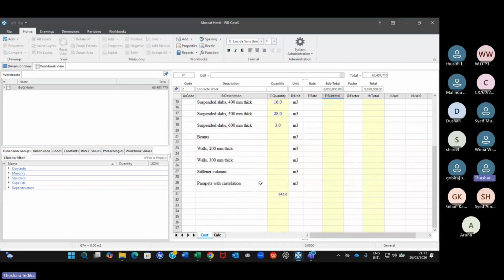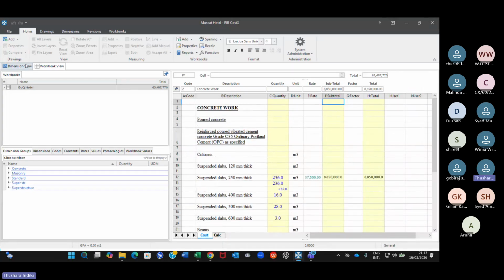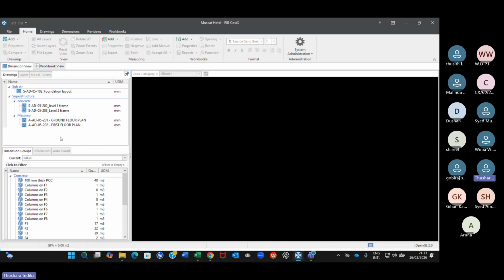This is where we produce the BOQ, and the concrete wall work also the same. We measured quantities. I just wanted to show you something special here. Now let's assume a common situation, especially for consultant QSs. You start measuring from a particular set of drawings, and then maybe 2 weeks into the measurements, the architect will send you another, updated set of drawings. As a quantity surveyor, you need to compare, because sometimes you have already measured from the previous set.